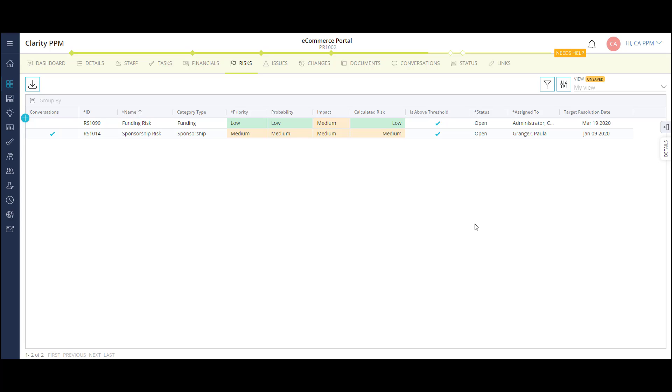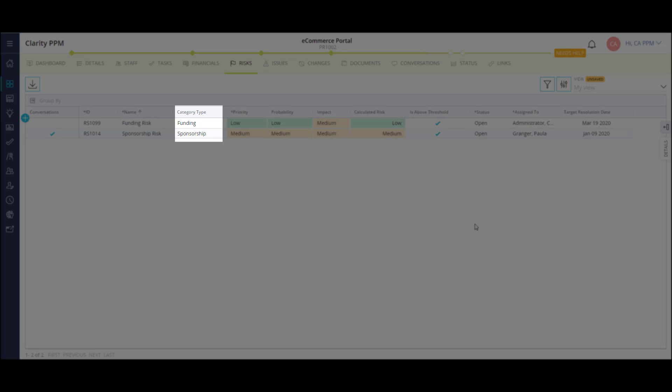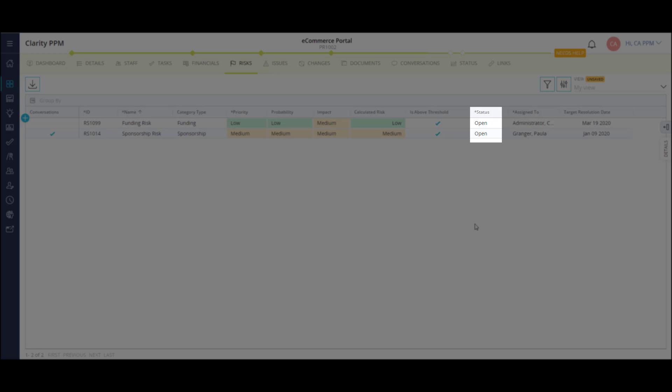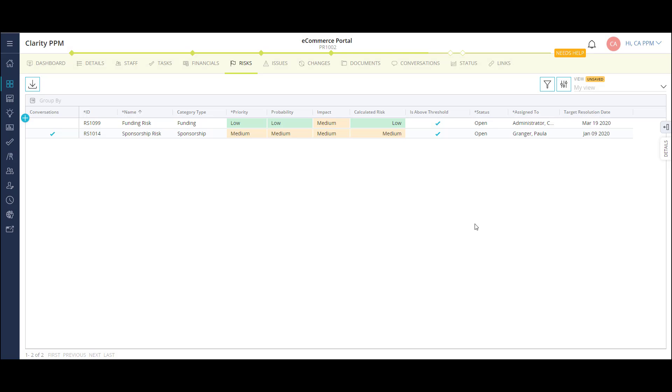Like other pages, I'm able to see some key areas of information in the list, like category, priority, probability and impact, and status. I can also configure additional columns to this view.